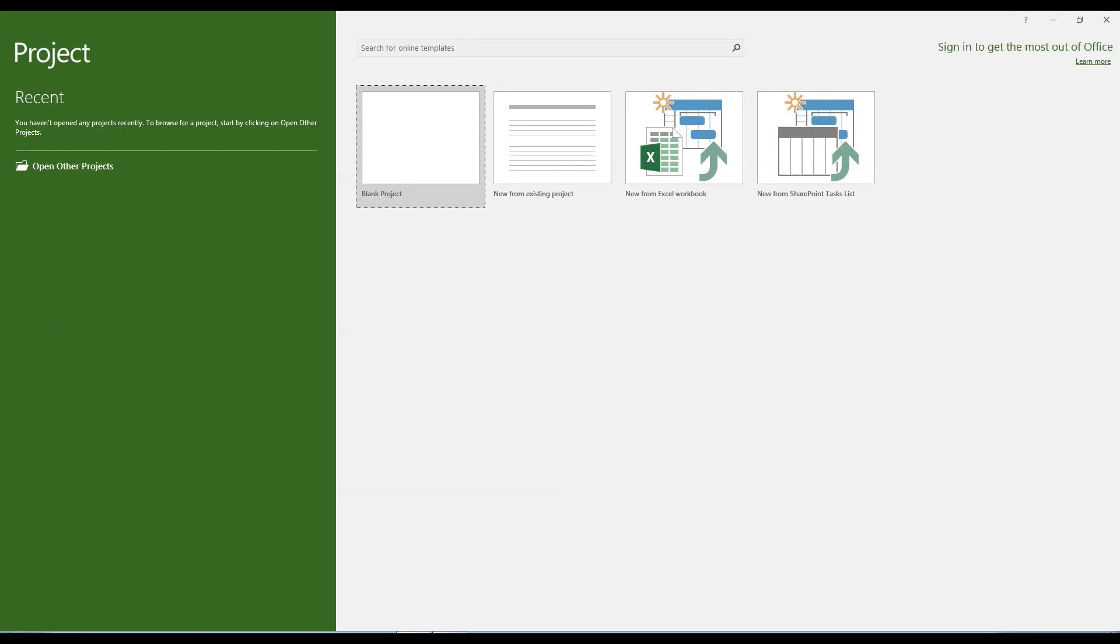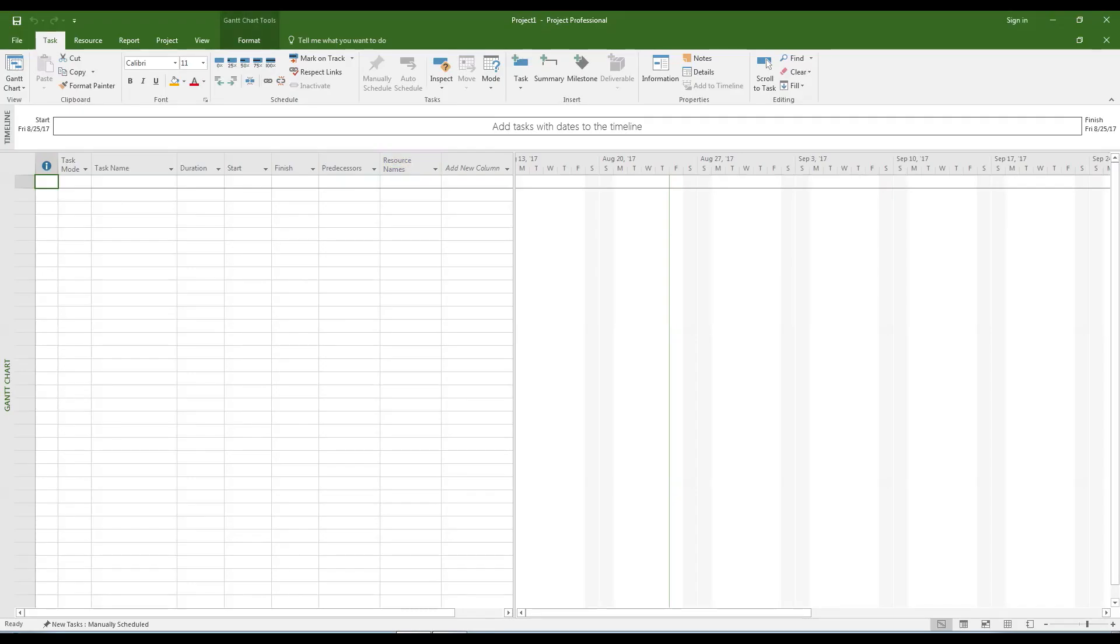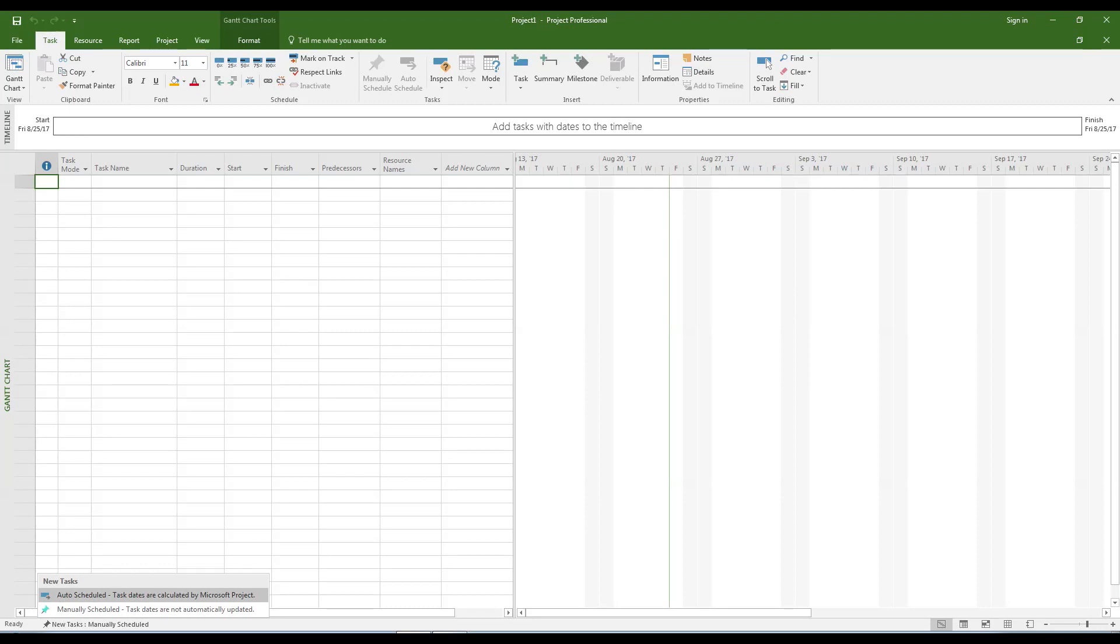Launch Microsoft Project. Select the blank project template. Set the task mode to auto-scheduled.